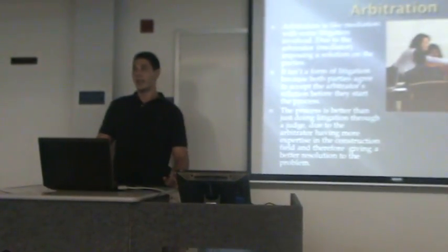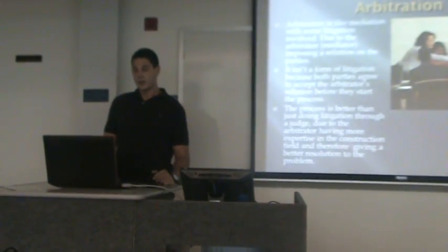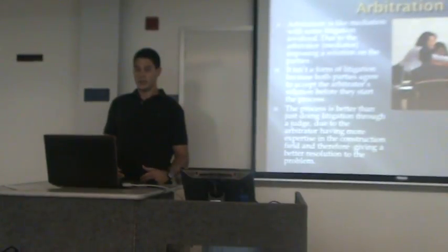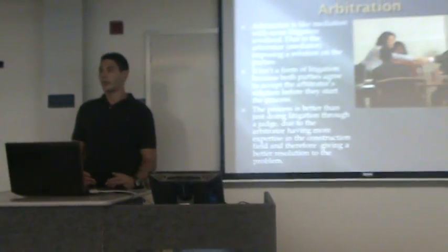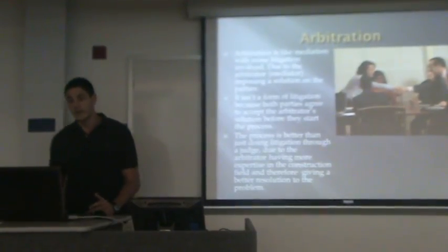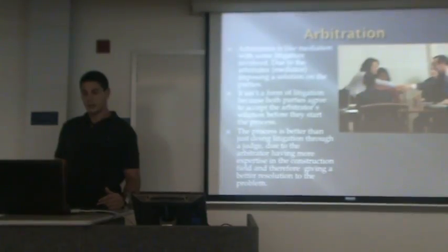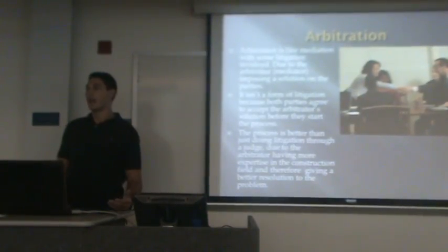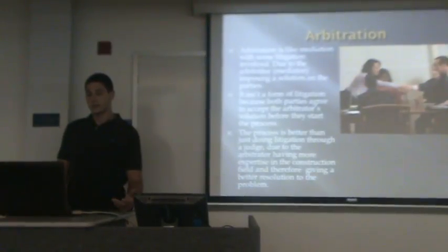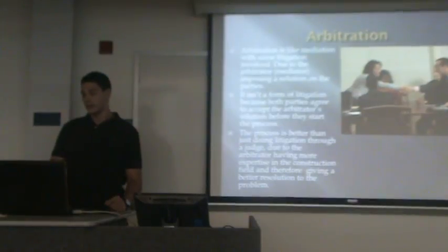Arbitration is like mediation, but with some court or legality to the form. It isn't a form of litigation because both parties agree to accept the arbitrator's solution before the process is started. But it's better than litigation because the arbitrator, who's the one conducting the solution, usually has experience in the construction field, so the solution that he reaches is better than a court judge who has no experience in the construction field.